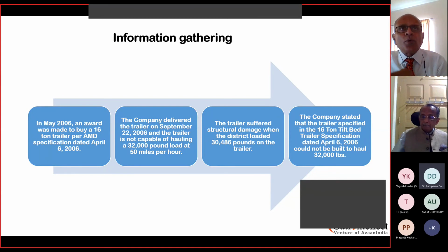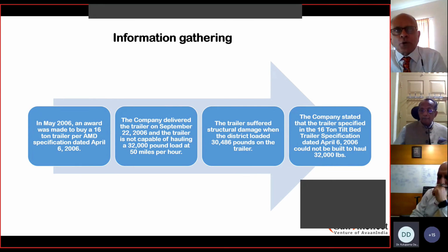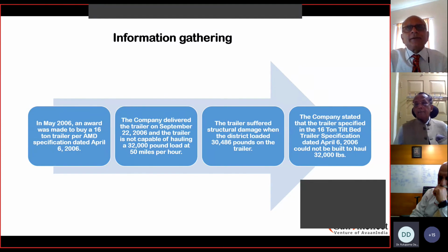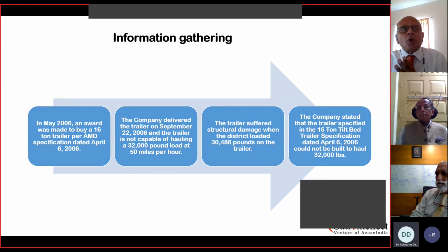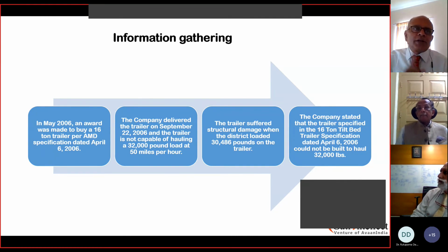Both of them now have understood what the need is and what is expected, and therefore what would be quoted subsequently. So it all begins with a very clear, detailed, and crisp document that drills down to the minutest of details: what the need is and what the requirement is. What is the deliverable of a service provider? What is it that I'm expecting as a buyer of the service provider? So that becomes the starting point, so that what we spoke of on day one as an RFP would need to be translated and given to the service provider.